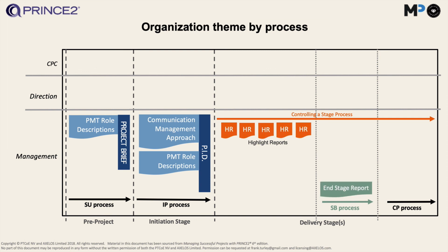Another good communications document is our end stage report. This is created by the project manager towards the end of the stage and reports the performance of the last stage as well. So that's a good review document for the project board to actually use. And then at the end of the project, the project manager will also create an end project report on how the whole project went as well. And again, that's for the project board. So those are the main documents we use to communicate during the project.